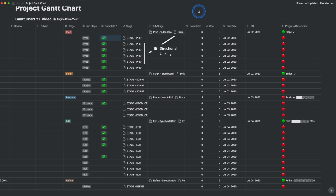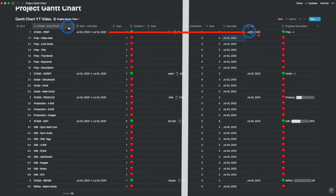So now if you divide completed by goal, you get exact percentages for completion. Because of the bidirectional linking feature, you will notice that the activities show up the task they are linked to, and the tasks show up the linked activities. Since we've used a date range, we can use another rollup feature where we select the last date of each task as the due date for the activity, just to avoid additional data entry.